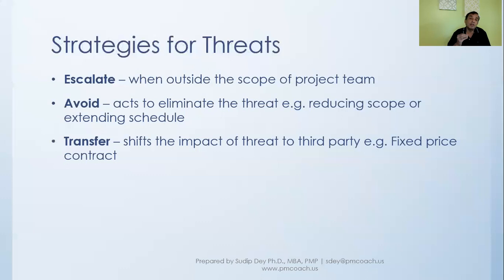But as a buyer, you might want to say, okay, fixed price contract, saying that, well, maybe you will charge a little more for a fixed price contract, but I don't want to worry about if you will take more time, less time, and so on. Let's put a fixed price. So when you put a fixed price, you really are not affected by any variation in the project. So this is a transfer. You are shifting the impact of the threat to a third party.